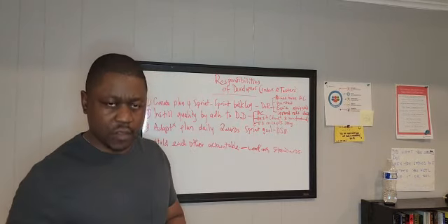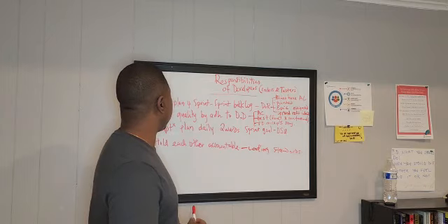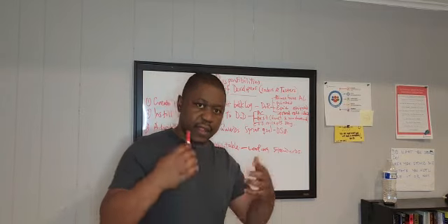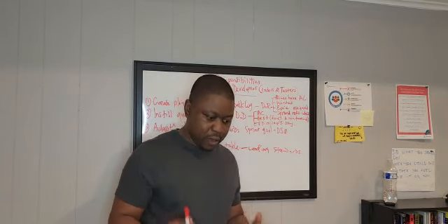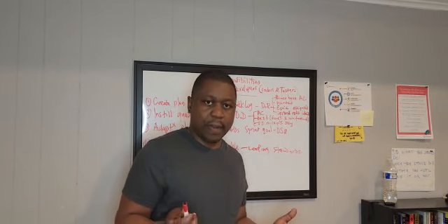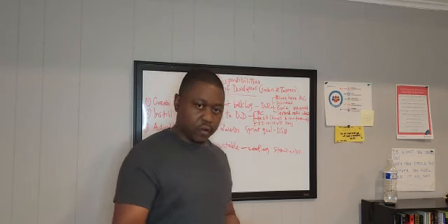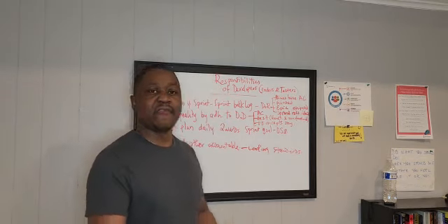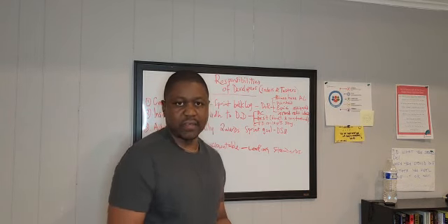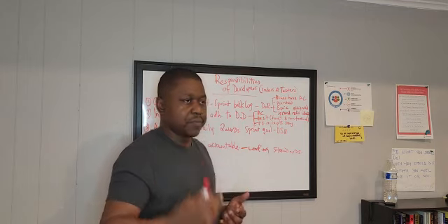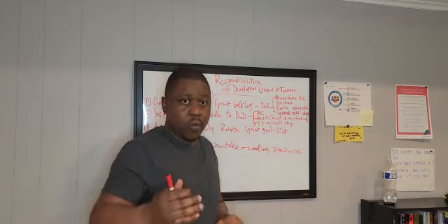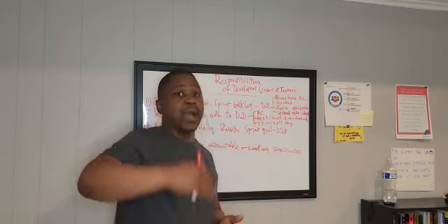So the developers on the Scrum team, number one, are responsible for creating the plan for the sprint. In other words, they are there to make sure that they have the sprint backlog ready to deliver on. So how does this sprint backlog come about? During one of the events of Scrum, the sprint planning event, the developers and the product owner come together, and the product owner suggests those user stories that she desires to be worked on, as per the priority.